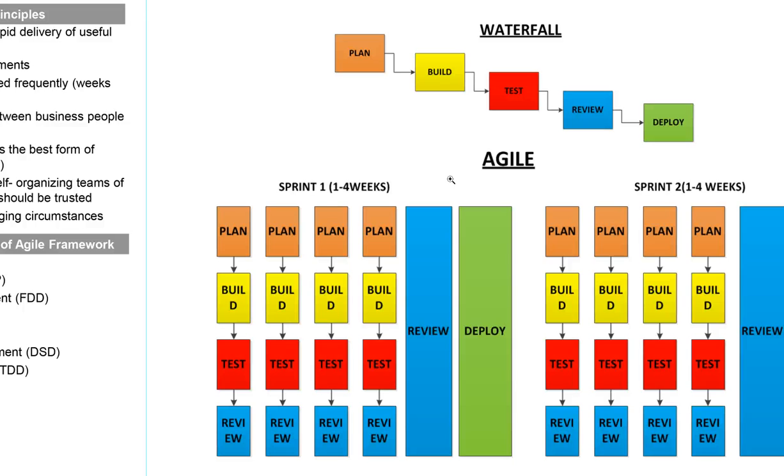So what I'm going to give to the stakeholder by the end of week 4 is the complete login, where I have worked with these 10 user stories, where the customer or the stakeholder can go in at the end of week 4 and test if that's what they were looking for and if everything is working fine. If for some reason there is a problem, then that problem would probably be taken and tackled in the next sprint. Or if the problem is a really big problem, then they will have another new sprint set aside for fixing that.